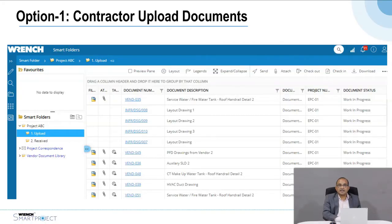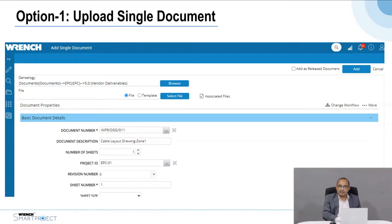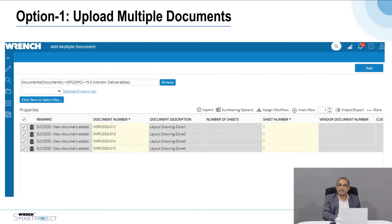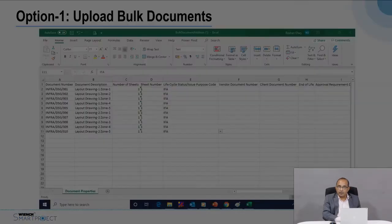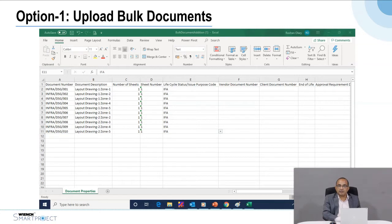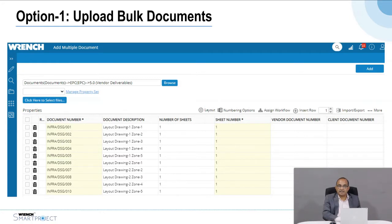The contractor can upload drawings in different ways. One option is that as they log in, each contractor is provided a folder and they can upload the drawings they are supposed to provide to the client. It could be one drawing at a time where they provide the document and its metadata, or if they have multiple documents, they can provide the metadata along with the file. For large volumes, they can create an Excel sheet with all the documents and bulk upload it, which helps upload large volumes in a very short time.